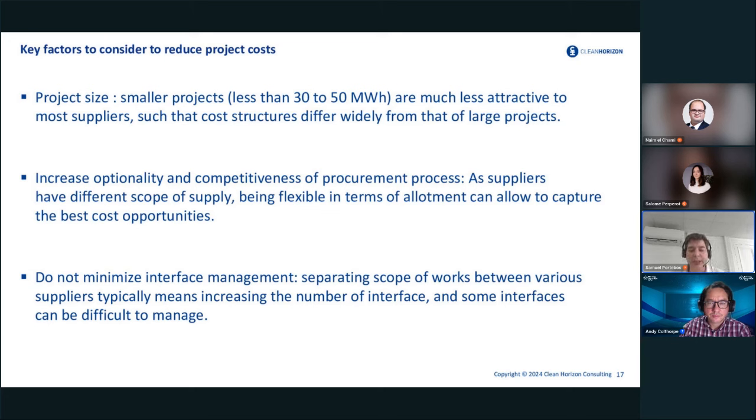All of this really needs to be designed and engineered, and something that we see very often is that it's a little bit left over during the design part of the project and is only considered in a later stage, which is not a very good practice, obviously. So one very important point is, as in any project, that all the different interfaces and communication need to be managed and tackled early on to avoid problems later on. But that's unfortunately something that we see quite a lot in many projects, where these aspects are considered a bit too lightly at the beginning of the construction phase.